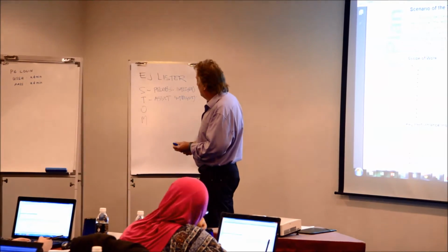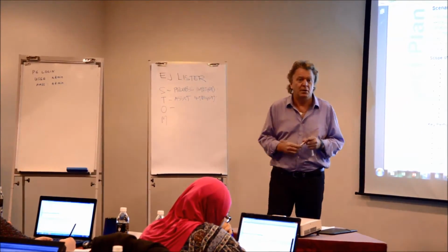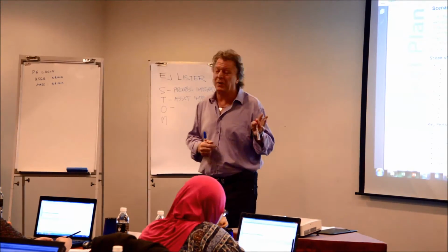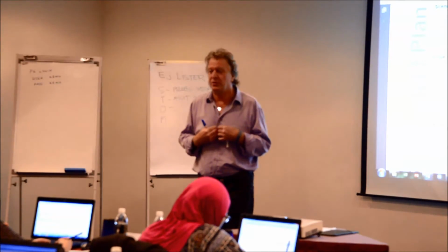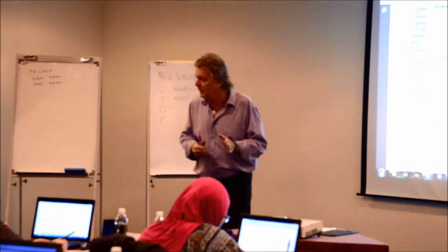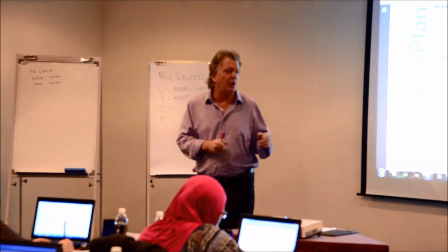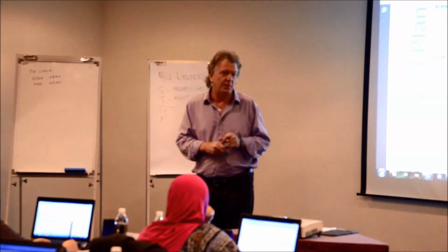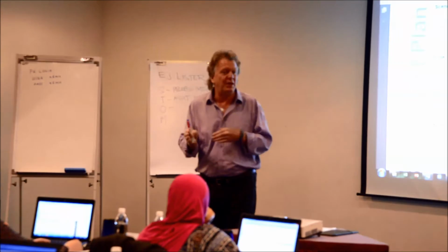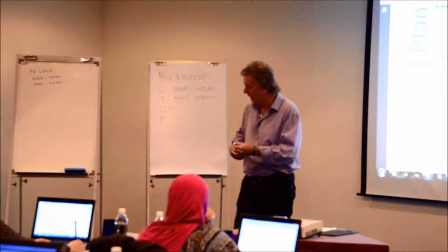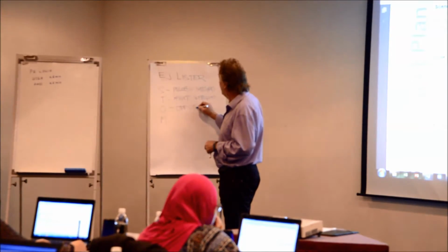So what do we mean with outage, do you think? There's something unplanned. And that's a good example. But here's the terminology we're going to use. An outage is maintenance that we cannot do when the plant is running. Like an overhaul on a compressor, for example. We take an outage to perform that because we cannot do it when we're running the plant. So this is what we call off-stream.